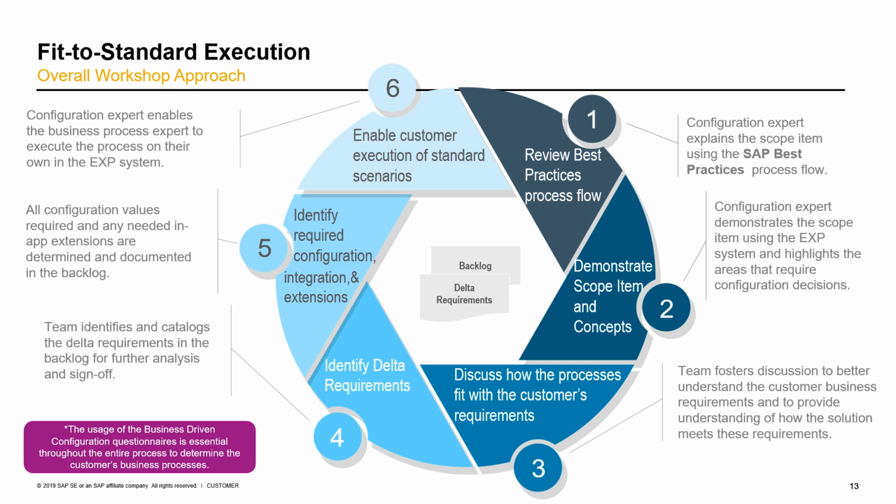Next, the configuration experts will use either the sandbox or exploration system to configure and review and highlight areas that require configuration decisions. One of the key parts of this is for the configuration experts to use sample data from the customer so that way the customers are familiar as they're going through the process.